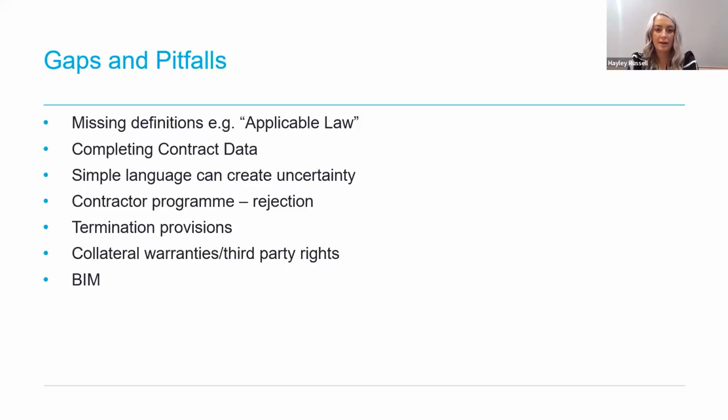Another gap in the NEC contract is that it doesn't provide, in NEC3, sorry, it doesn't provide for what is to happen when the project manager rejects a contractor's programme or if the project manager does not respond. And in practice, this meant that projects often proceeded with no accepted programmes. In NEC4, one of the changes included provides for a treated acceptance of the contractor's programme by the project manager if the project manager does not respond to a programme issued by the contractor for acceptance.